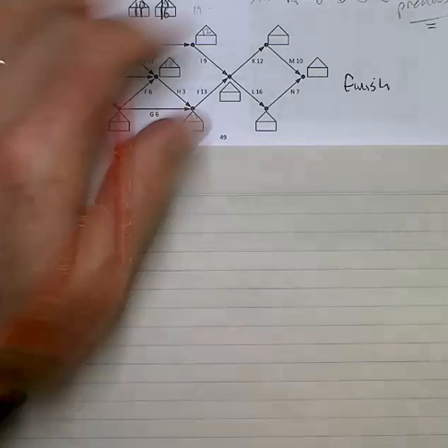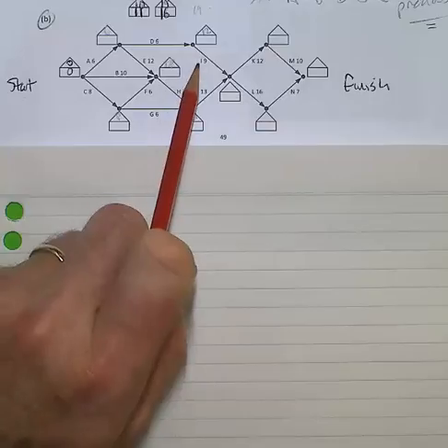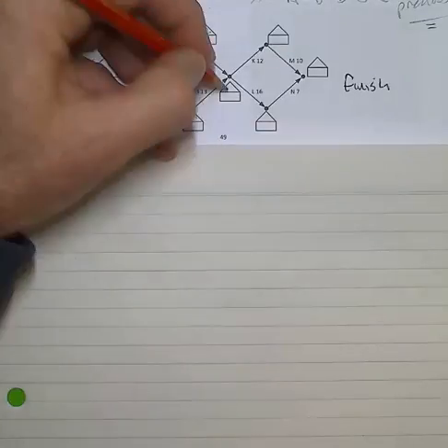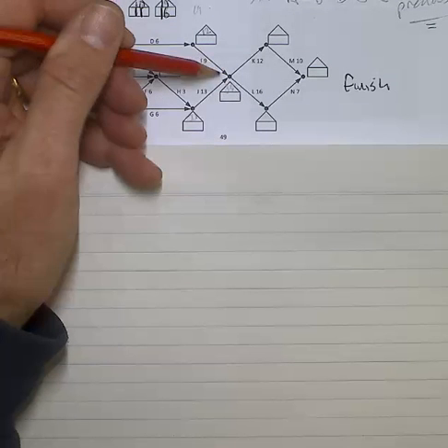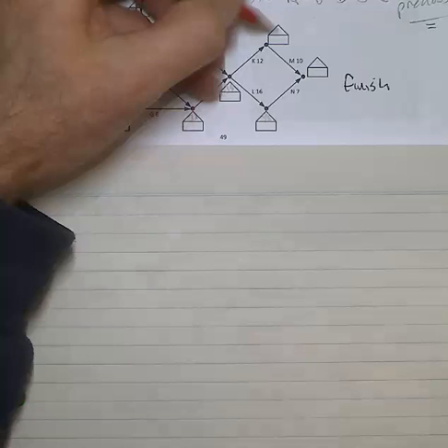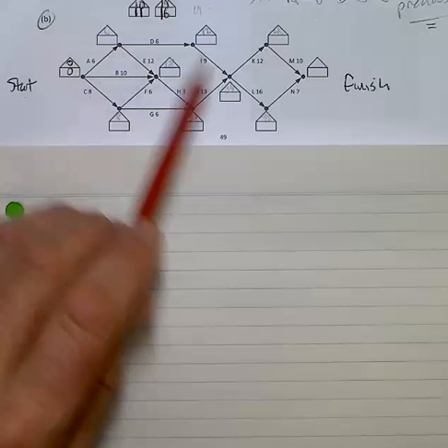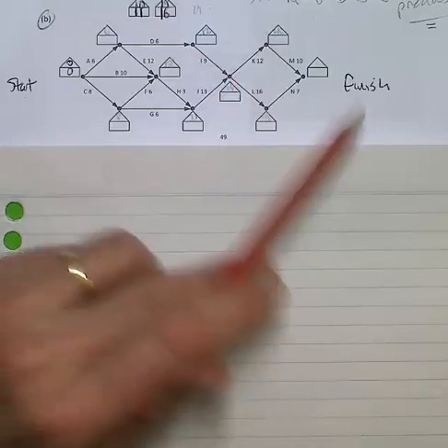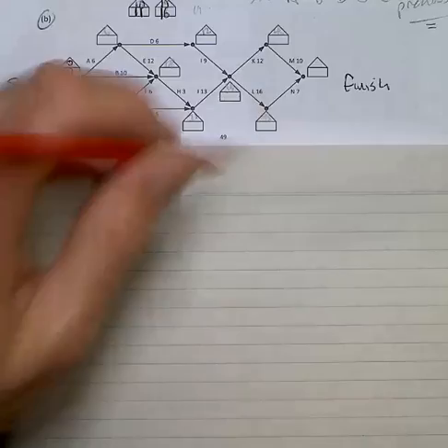So I've got everything right to the junction of J and I. Now I is 9, that would be 21. That's 34. Obviously the 34 wins out. Next step, I've got a 48 for that lower junction, only option there, and 46 minimum earliest start time for M, rather, is 46. So 56 or 55.